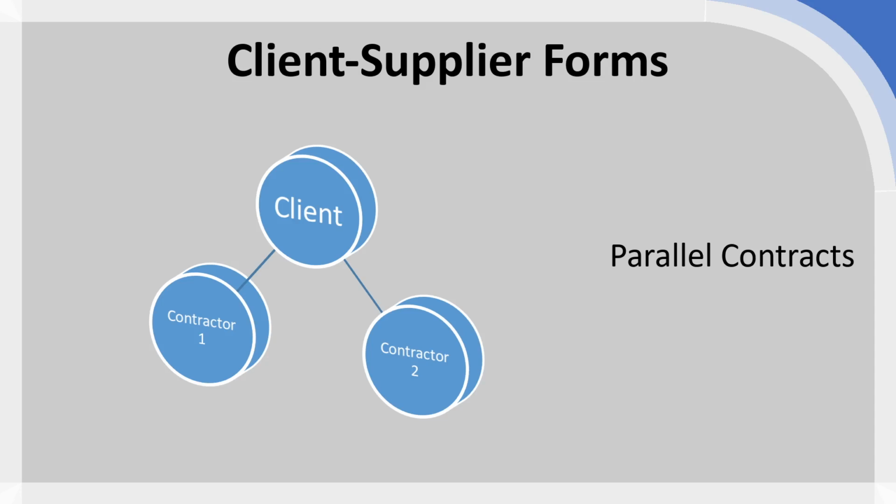If we consider here an example where, let's say, as a procurer, you're looking to renovate a particular room, so your project is to renovate a room or a facility, then in a parallel contract, you may have different contractors providing a variety of different inputs, or perhaps providing the same input but split across multiple suppliers. The onus for actually coordinating that work, making sure different packages are done at the appropriate times, all would fall upon the procurer or the client themselves.